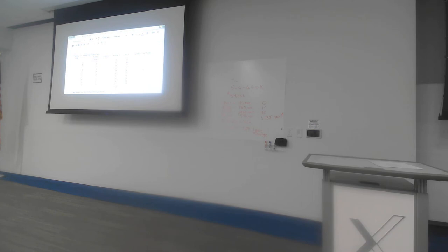Now, based on these examples, I usually do that logic in my head, but I could easily write out a formula to help me do it if I wanted to. So, just give myself a little bit of room here. And what I'm going to do is, what the calculation was there that I just did, I'm just going to say the crash amount, which is crash euro, subtract the normal amount, whatever that normal cost is, put that in brackets. And what I'm going to do then is I'm going to divide in the normal duration minus the crash duration.